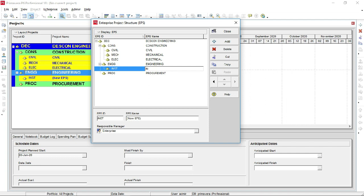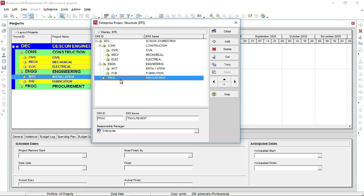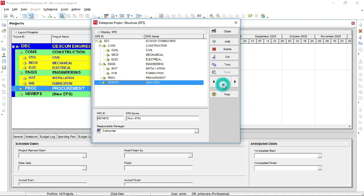Now add Fabrication and Installation as sub-branches under Engineering, since those are the areas in which this company is working. This is just an example to show you how to create an EPS for any company working on different projects — its company project portfolio. Under Procurement, shift it down and shift right to make it a branch of Procurement.